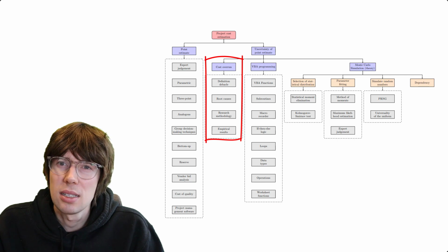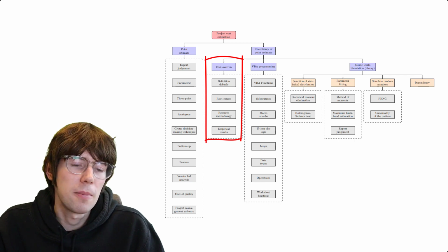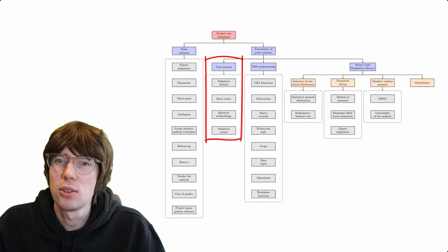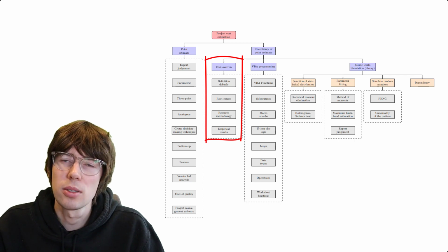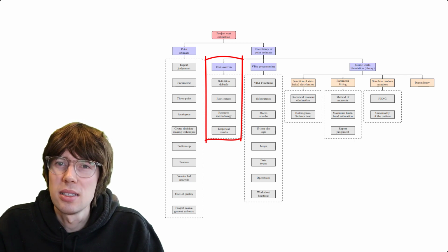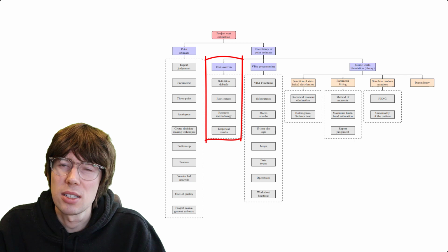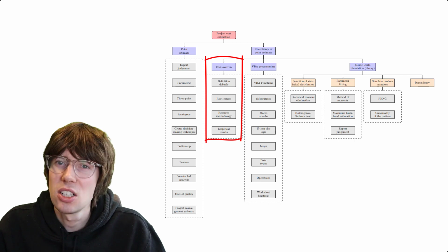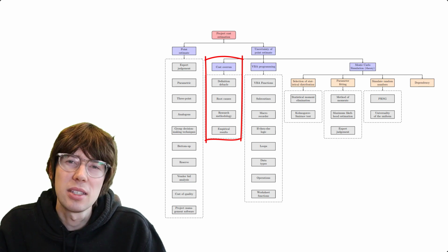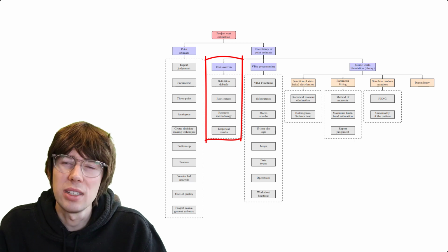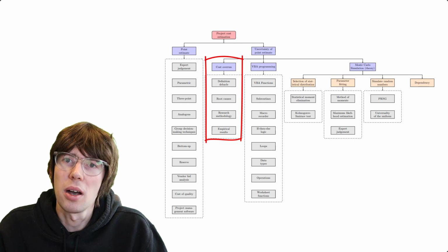What they did is make a theoretical framework, stating there are three fundamental reasons for cost overruns. One is random errors and mistakes. Another is strategic misreporting. That's when whoever is estimating cost is intentionally lying because, if this is procurement for instance, they want to win the bid. But the third fundamental reason is cognitive bias.